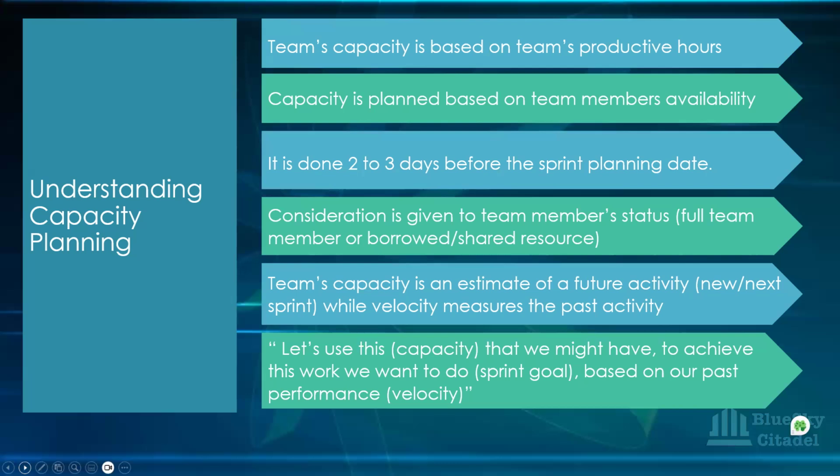So as the sprint goes on and you're working, if you have capacity to take in more, you can. If you have a tech lead, you can talk to your tech lead, how are things looking? Do we have developers? Can they take in more? Even if you don't have a tech lead, during your stand up, you can ask them, oh, I noticed that the stories in either the ready column or we're doing a lot. We still have maybe 3 or 4 days to the end of the sprint, and we've moved on a lot. If we're not careful, it gets to a stage where guys don't have work to do. Now you call upon the product owner: so now we have capacity maybe to be able to take in 2 or more.